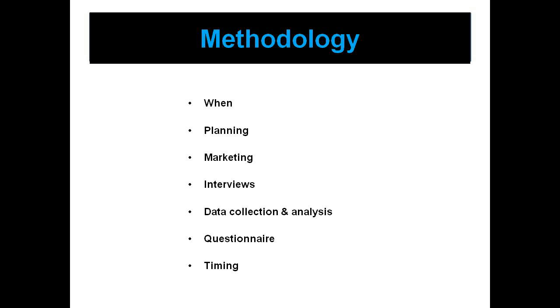The investigative POE, with interviews, surveys, photographs, and video recordings, and ratings using a 5-point Likert scale. Quite good response, and the information becomes valuable for us to make some decisions with as well. And then a diagnostic POE, which is a really long-term cross-sectional evaluation that usually goes over a period of time. So once we've identified what type of POE we're going to use, when the POE should be considered